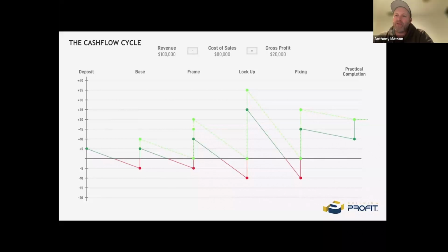But doesn't that add up to 120% now? No. So you still end up in the same place. And that's the point that Matt made. What ends up happening is effectively you're kind of front loading to a degree. So you just simply get paid more up front. And towards the end, that's why Matt's saying you get paid 20K, but you've got 20K worth of bills to pay on it. Yeah, right. So that's all that's happening.